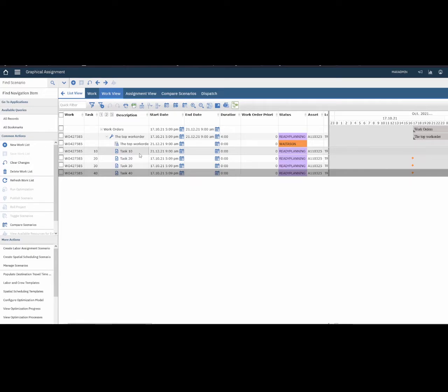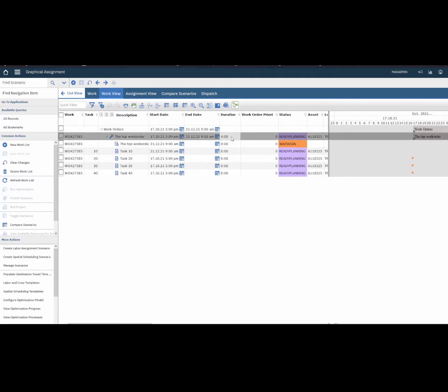And that's where our base problem stems, because you can see tasks 20, 30, and 40 are still stuck here with a 0 time frame, which is not unusual. For good practice, you should always have a duration. Always. Because that will feed into the assignment.